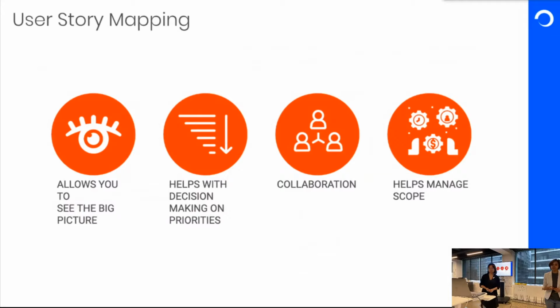As Gwen was talking about these things, we asked the question, how many of you have used a project management tool or Jira? A story map can live in your project management tool, but at the same time, how we have used it, we have actually put them on the walls of wherever we are working. We create a huge story map behind our project team, with the features broken down into multiple stories, and we usually initiate all of our conversations against that user story map, asking, hey, which feature are we talking about? Which story within that feature are we talking about?